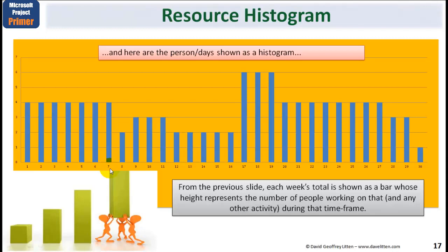Alright so far? But let's suppose that we only had 4 people available to us. Well, just looking at this, we can see that this period here is going to give us a problem. Here apparently we need 6 people for week 17, 18 and 19. There are 2 things to consider here. It might be that since we haven't got these people, then the tasks within this period need to be adjusted so we don't need any more than 4 individuals.